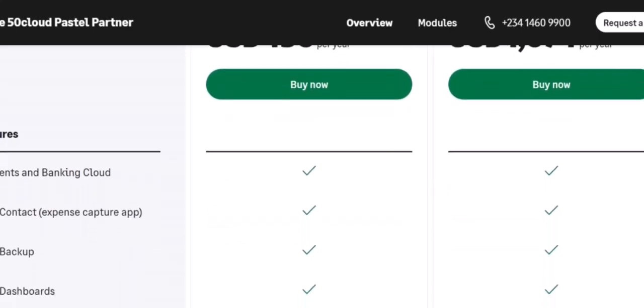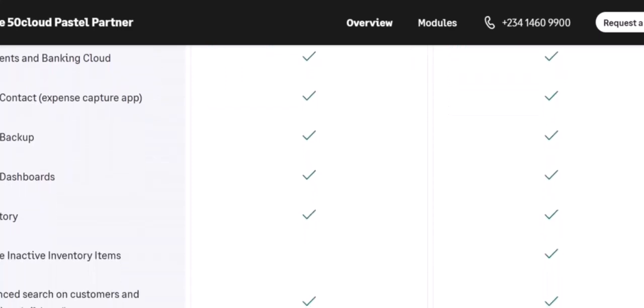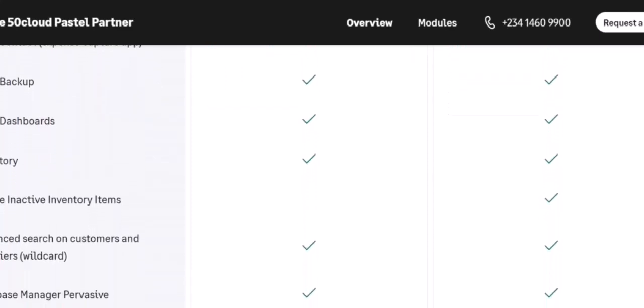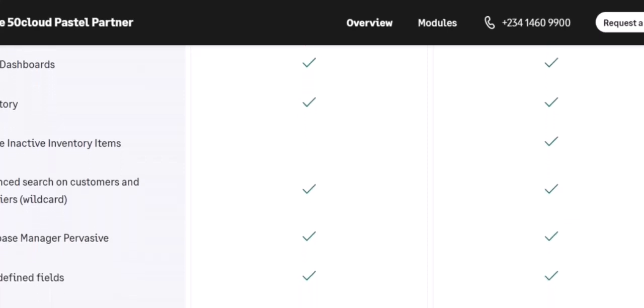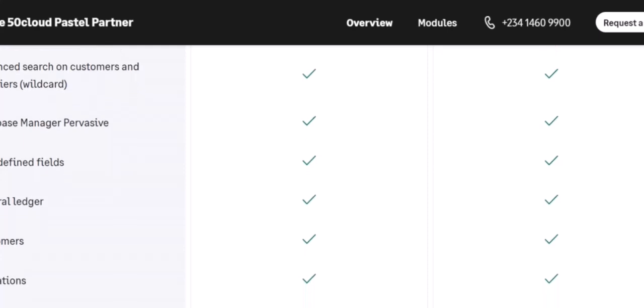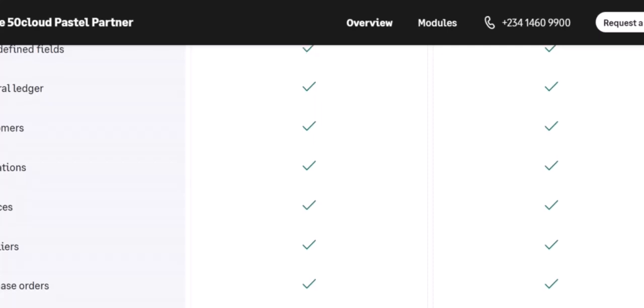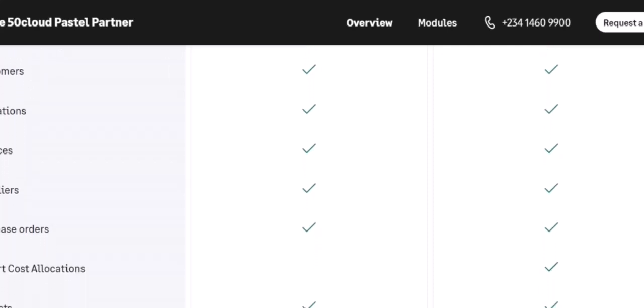Indirect costs, on the other hand, are overhead expenses that benefit multiple projects but need to be allocated appropriately. Examples include rent for office space, utilities, and administrative salaries. Sage Intacct provides mechanisms to allocate these indirect costs to individual projects based on predefined rules or allocation methods.